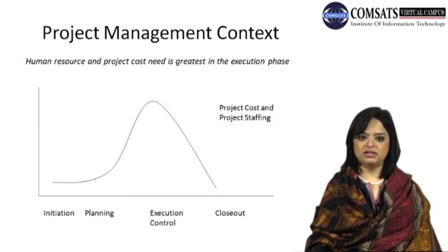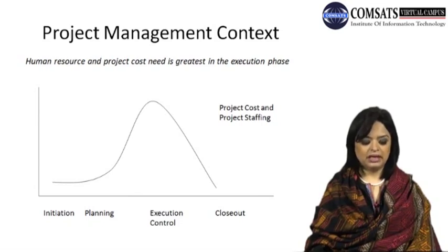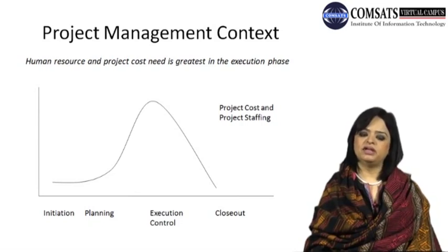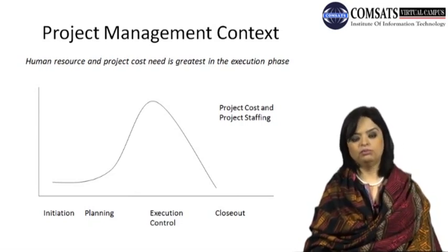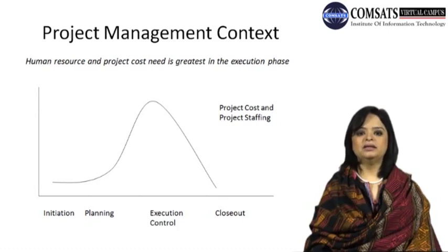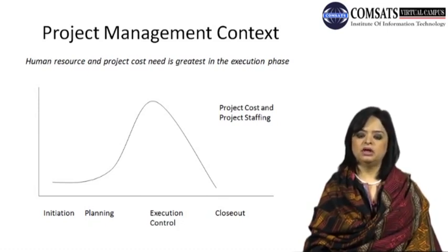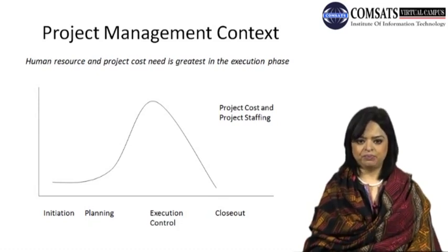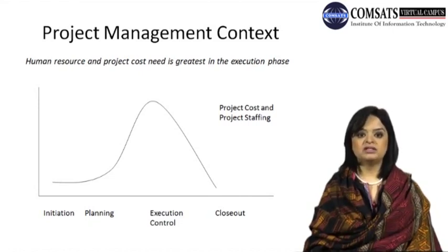At the initiation phase, the need for resources and the cost is the lowest. Within the planning phase, you start to acquire a little bit more of resources, and in this situation you may be acquiring the services of people like consultants, subject matter experts, because one of the most important activities in the planning phase is the process of estimating.